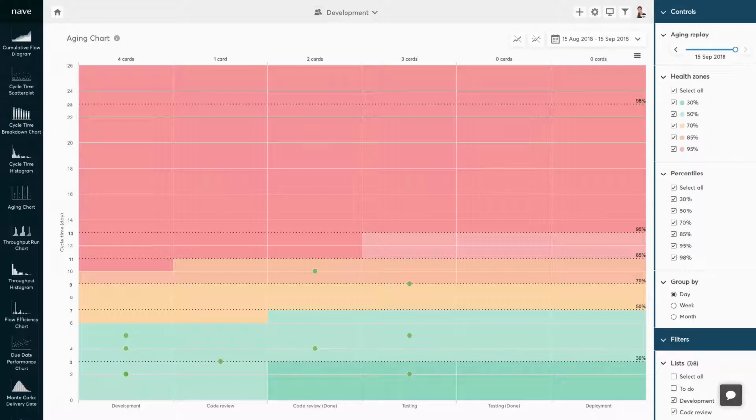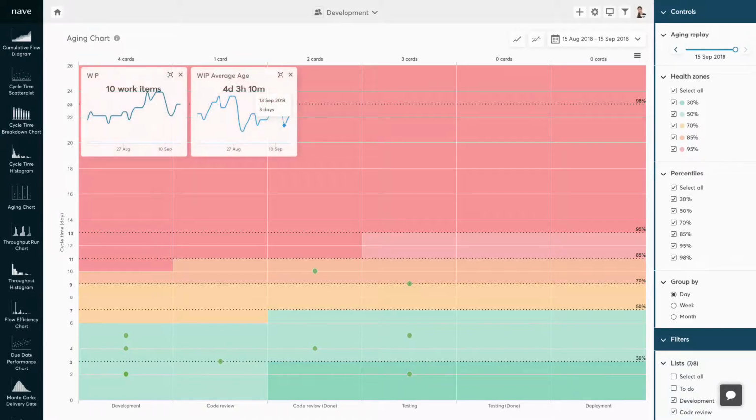According to Little's law, maintaining a stable system depends on two main factors: your work in progress and your average age of work in progress. For these two metrics, the key is consistency. Stable systems are determined by keeping both your WIP and the average age of your WIP consistent. And the more stable your delivery workflow is, the more predictable it becomes.